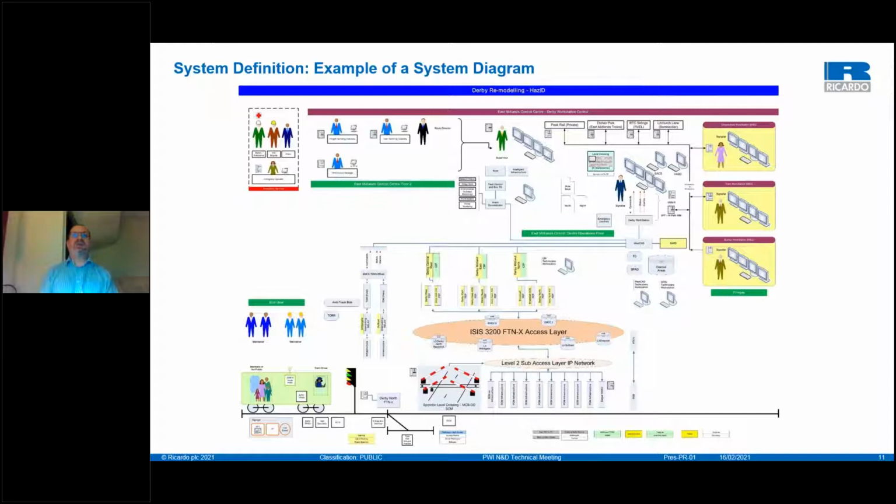In practice, you would break that down into a set of hazard identification and risk management activities throughout the duration of that particular project. This diagram would be a good way of working through the interfaces and the impact of change on the signalers, the train drivers, and members of the public, and trying to identify opportunities for harm to come to individuals.